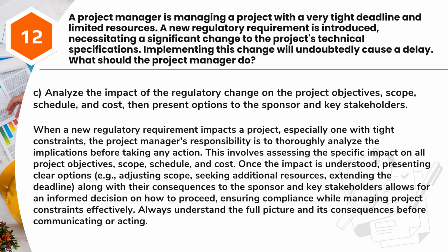Answer: C. Analyze the impact of the regulatory change on the project objectives, scope, schedule, and cost, then present options to the sponsor and key stakeholders. When a new regulatory requirement impacts a project, especially one with tight constraints, the project manager's responsibility is to thoroughly analyze the implications before taking any action. This involves assessing the specific impact on all project objectives, scope, schedule, and cost.